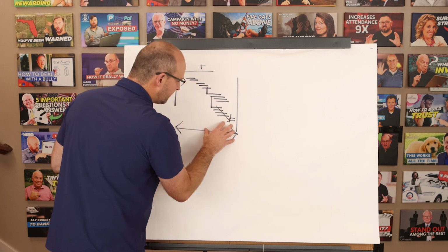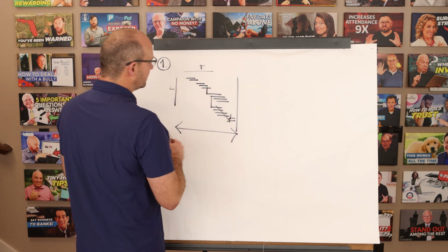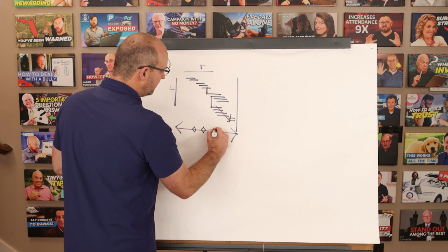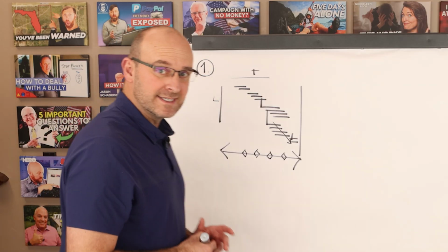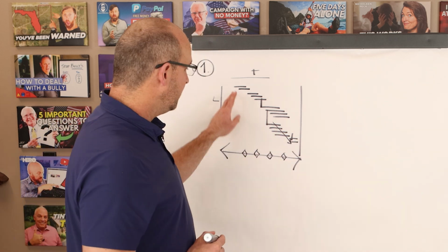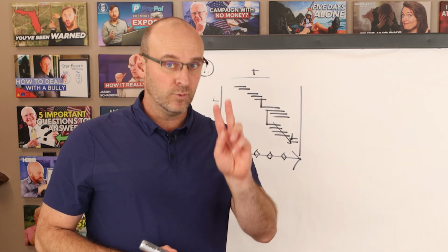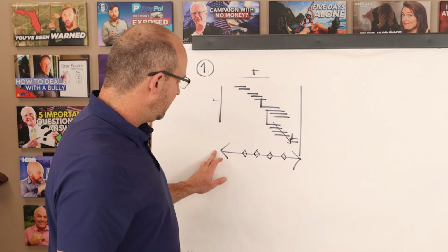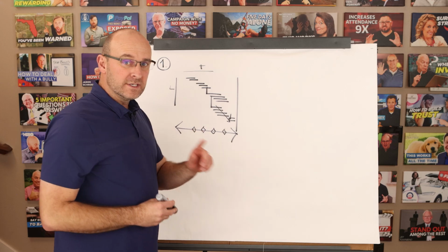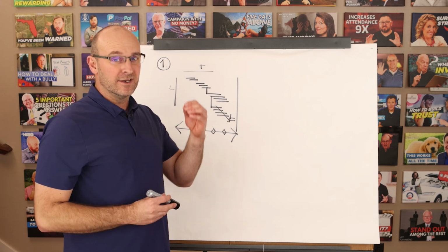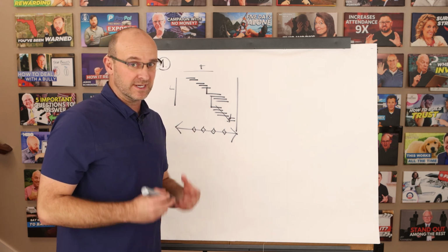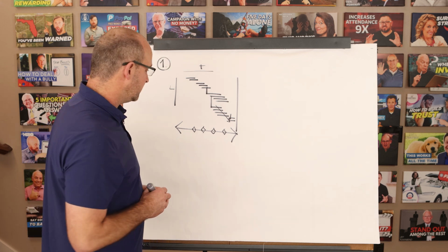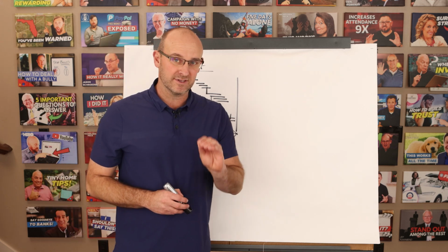Review with your team, have an overall strategic plan so you know the duration and you know the milestones along the way. Now, this is key because when you're doing your plan, you must have the right dates for procurement, you must have the right leveling and overall plan with your trade partners, and you must have the money. And so the oversight, the actual project management team here will need to be allocated for this project, and we will want the general conditions to reflect their salary or their general labor rate that we're billing the client for your general conditions. So this is absolutely key. We must have this on every project.